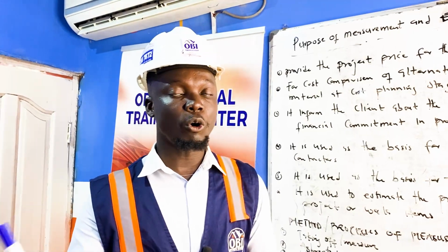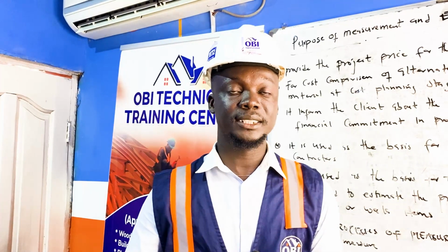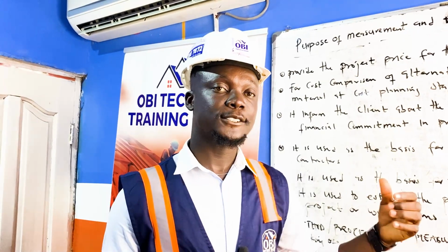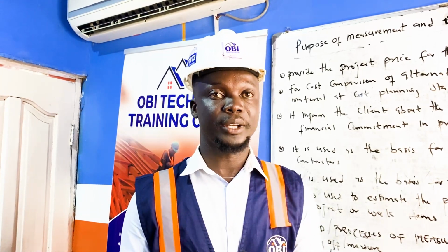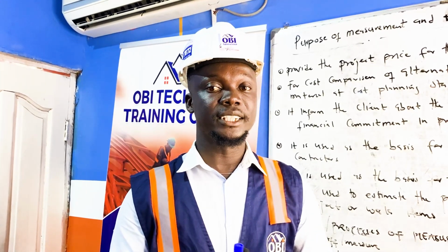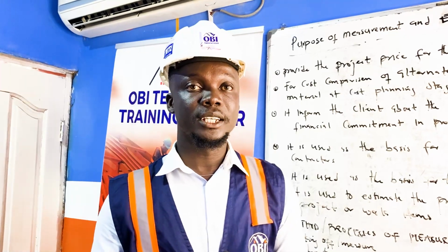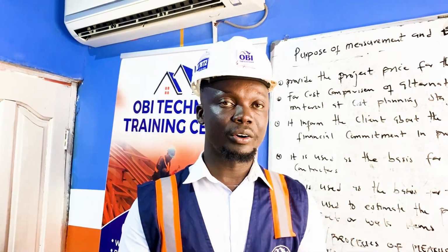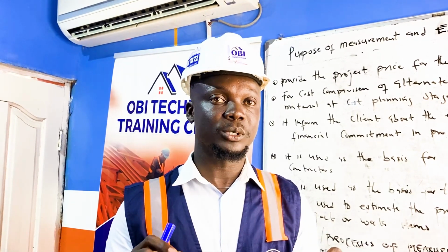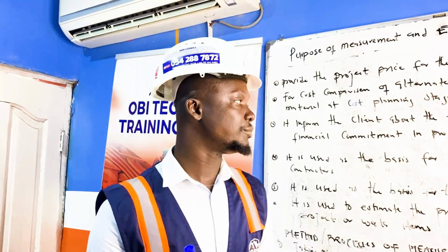submitted. So they will compare the contractor's quantities, or the bill of quantities submitted, to what the consultant quantity surveyor prepared, and they'll be able to see the differences and the ranges between them, then be able to select the correct or the accurate contractor that is qualified for the job.